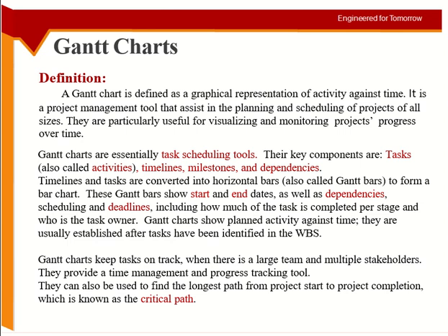You can mark your milestones within the Gantt chart. So after activity 10, I will have the first milestone. After activity 15, the next milestone, and you can mark them. First milestone, second milestone. Mark them with the date, or with the day on which it will be achieved. You can show important dates on it, and some of the milestones can be important for a reason which is outside the project, not because of the project.